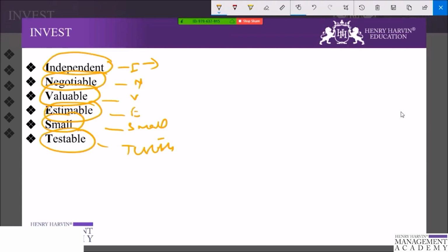When dependency comes into play, it may not be possible to implement a valuable story without implementing other much less valuable stories. So if there are three user stories written in a sprint, there should not be any dependency between them, such that A cannot be completed without B, or B cannot be completed without C. So try to make them as independent as possible.